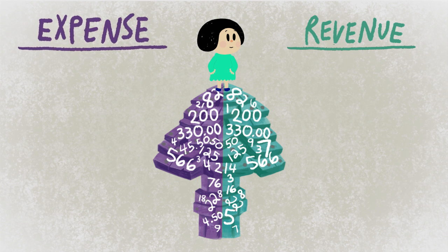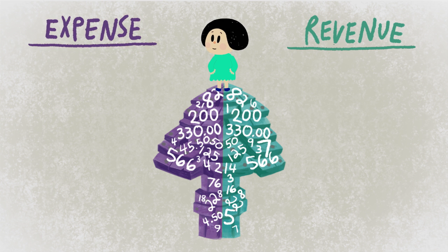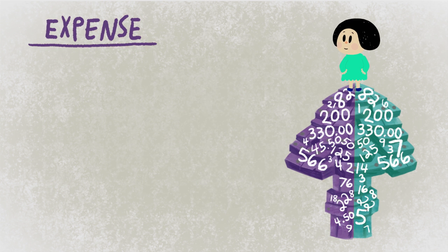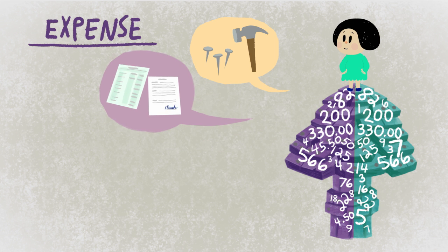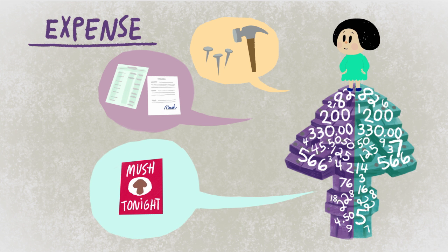The expense side of the budget should include all the possible expenses related to your project. It is broken into three sections. Artistic, any expenses directly related to the art making. Administrative, any expenses related to managing the business and logistical aspects of the project. And promotions, any costs related to promoting and marketing your project.